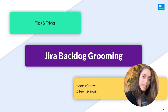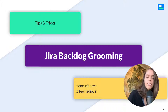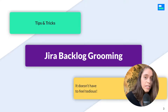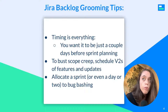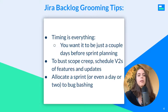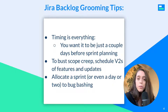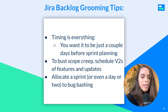Before I show you literally how to filter your Jira backlog for grooming purposes, here are some high-level tips and best practices — it doesn't have to feel tedious. Timing is really everything. If you do your backlog grooming too far out before your sprint planning, data changes and evolves, and you might be working with stale data. Doing your backlog grooming just a couple days before sprint planning is really the best — definitely not a couple of hours. You want to give yourself some time, but not too much time before the actual sprint planning.